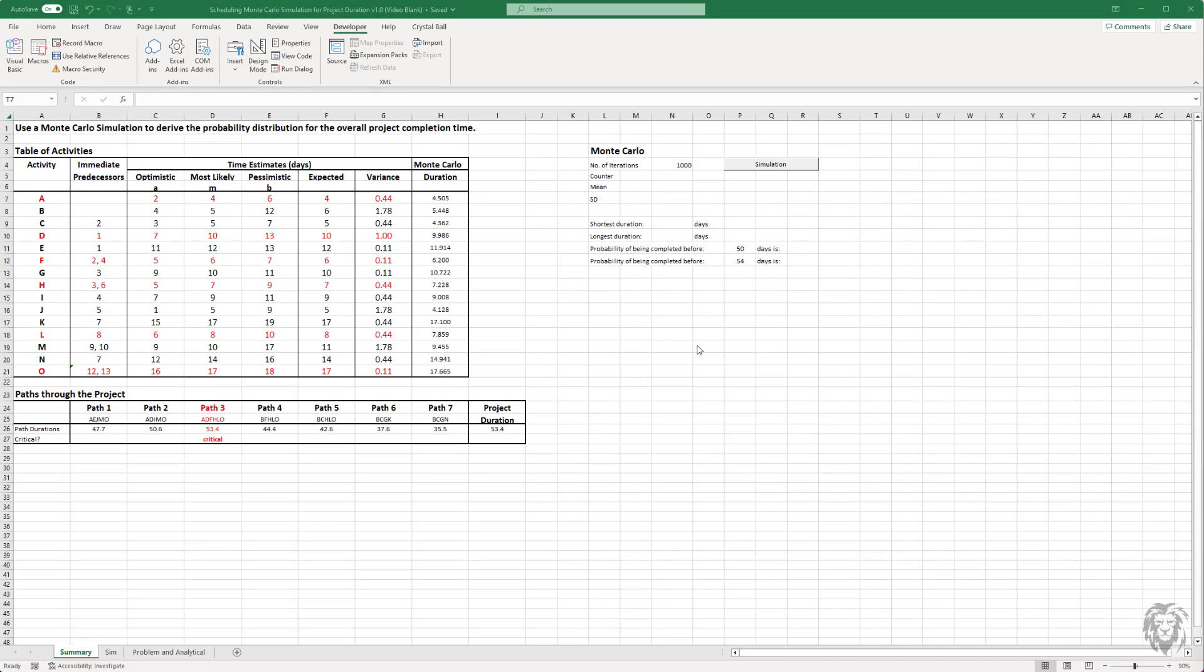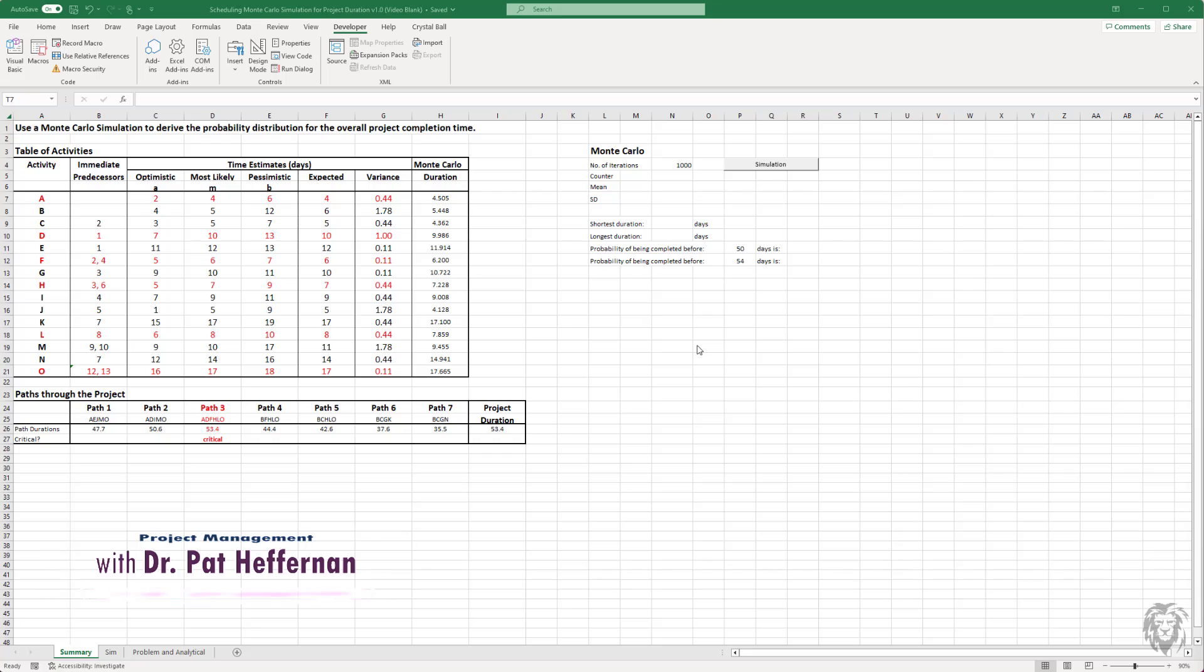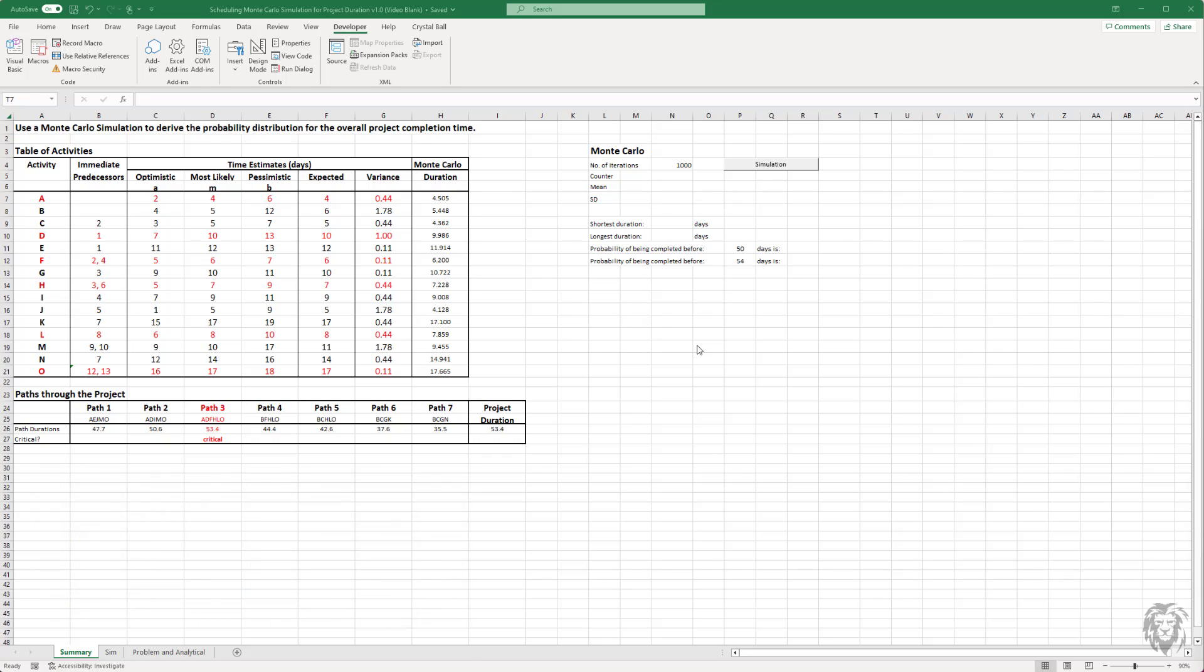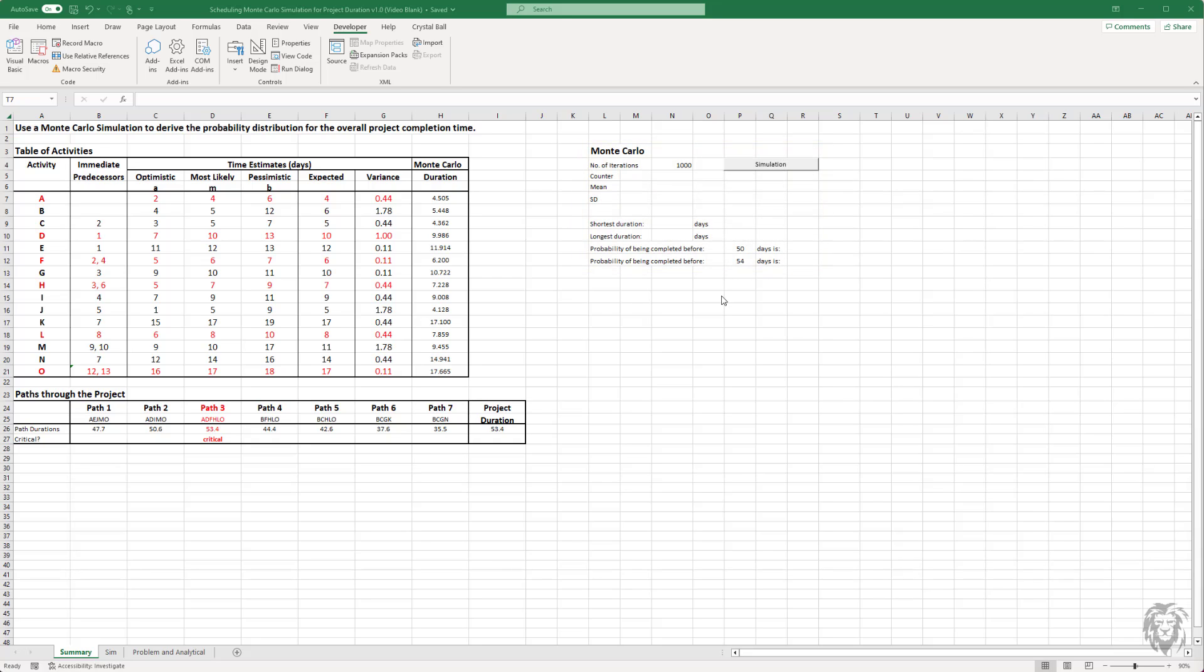Hey, I'm glad you decided to join us for the second part. So this is the same spreadsheet. I've put my outline of what I want to do to improve it. This dashboard up here where we can choose the number of iterations. It's going to go through and we're going to have it use a counter as it builds up its iterations, calculate the mean, the standard deviation, and then we can look at some statistical analysis of what's going on in our project and what's the likelihood that we're going to be complete by a given time.